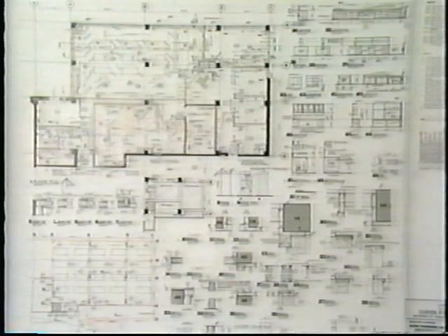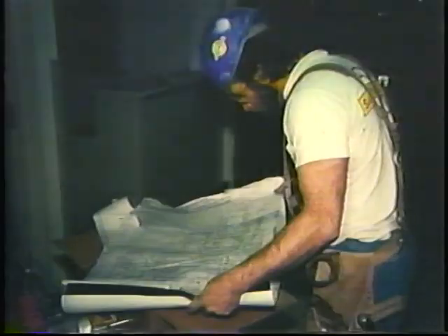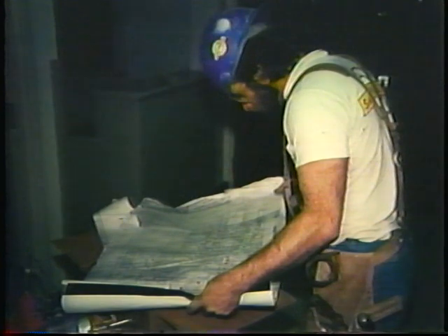Creating construction documents is a period of significant production. There is a lot of information to be transcribed to drawing and text. Every effort is made to eliminate mistakes that could occur later in construction. Once the construction documents are in use at the construction site, it becomes expensive to make changes from the drawings.